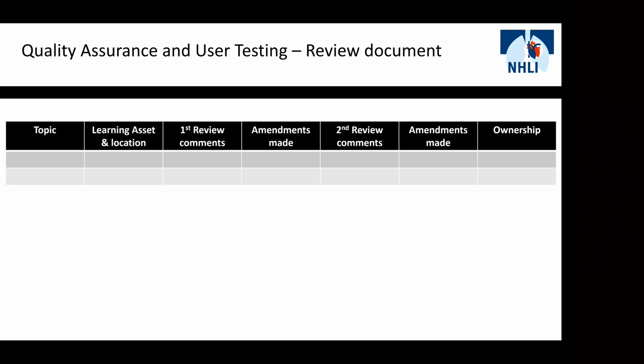I ended up spending, I think it was throughout a week, around 8 operational hours going through each piece of text within the virtual learning environment, where I had the subject matter expert speaking to me and I was manually making changes to content within the VLE. Now, as you can imagine, that was a huge waste of both our time, and it's time that we really didn't have. So I really encourage everyone within the conversations to absolutely make sure the content is what we need it to be before it goes through any development.